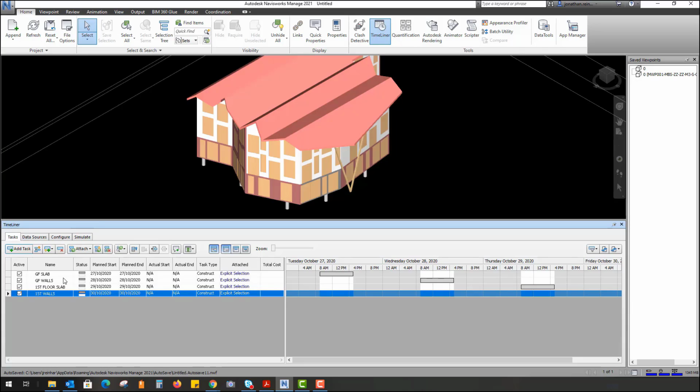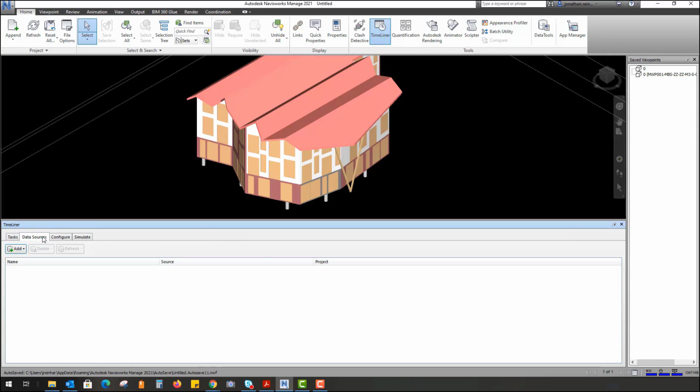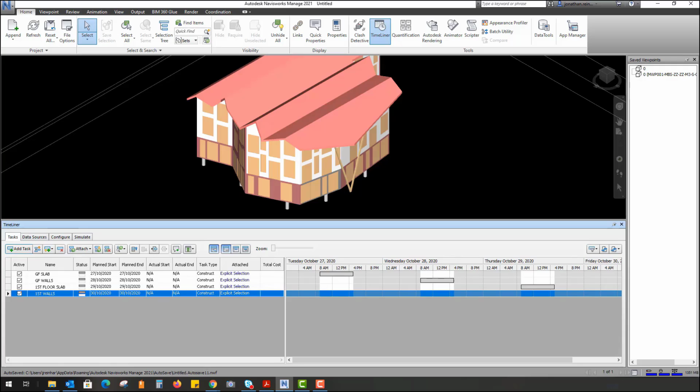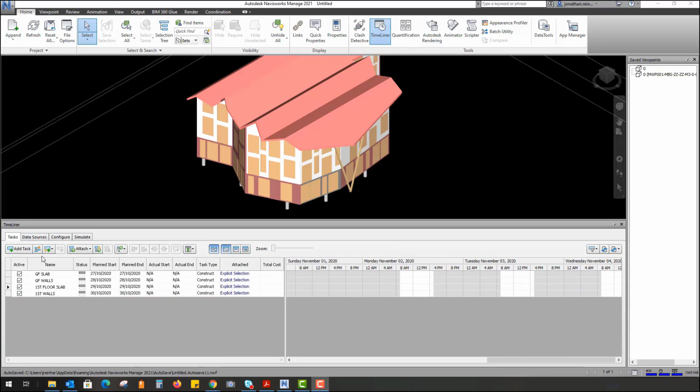You know, a construction model is going to have hundreds or thousands of tasks, depending what construction stage you want to construct it at. But you can link in with different data sources, including Microsoft Project or even Primavera as well, by pulling in that information, which is commonly used on construction projects as well. And being able to link that into your tasks entirely is possible too. You can also automate the adding of tasks as well. So just go to auto add tasks. You'll see it here just beside add task, insert task, or auto add tasks.